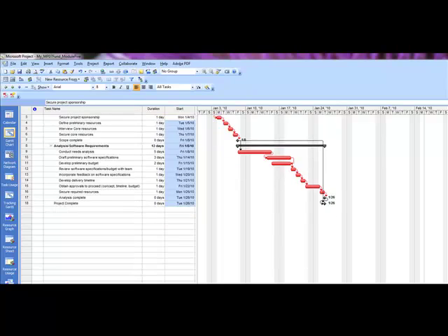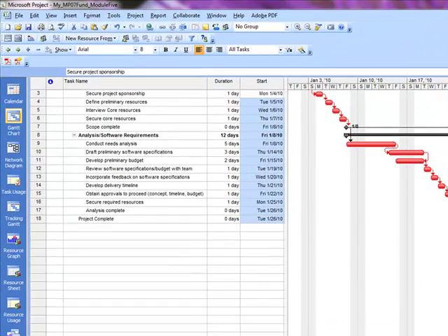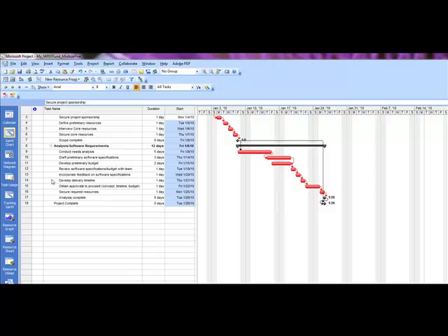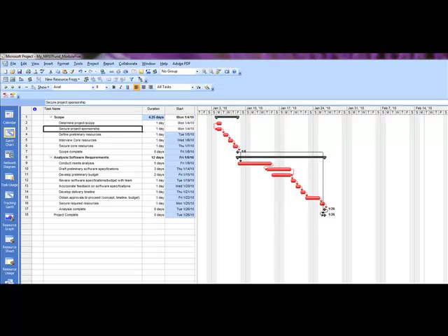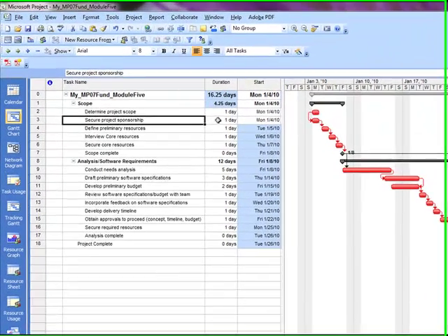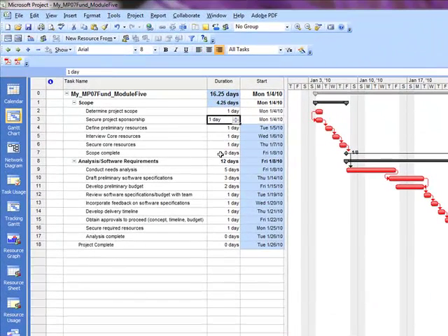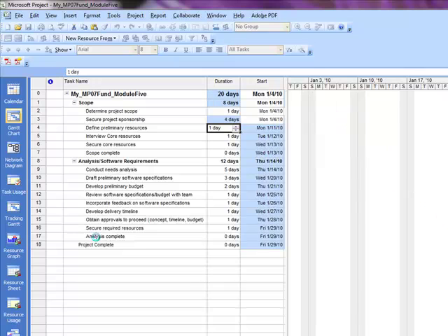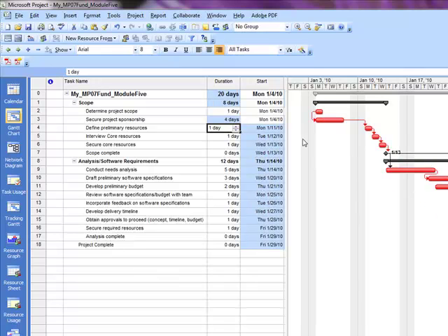Okay. Now what it's asking us to do is to enter a new actual duration for task 3 here. So for task number 3, and make sure that you're scrolled up here properly. For task 3, instead of it being 1 day, we're going to increase that to 4 days and hit the enter key. And what you'll notice happen is, because we represented it at 25%, you can see the difference here in our lag time between the two tasks. And that moves us on to the module recap quiz.